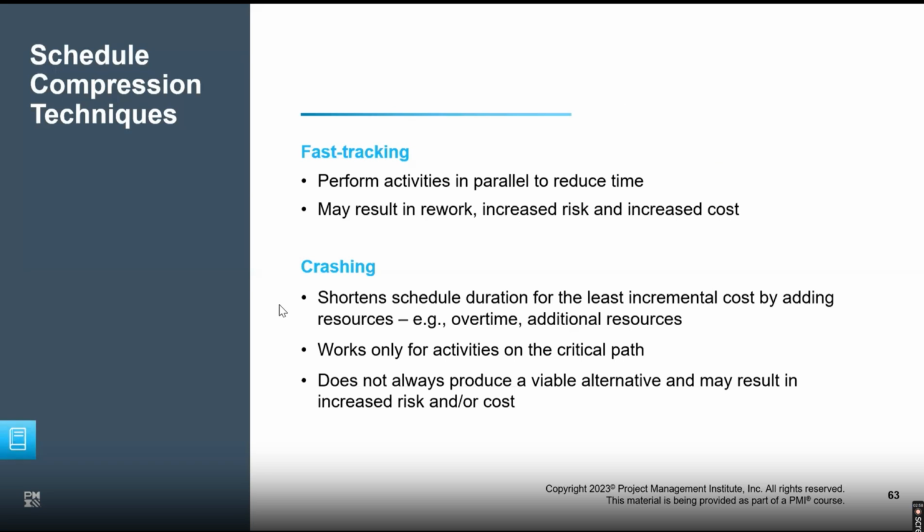See, contingency reserve will always be there. If the risk happens, then I use that budget. Otherwise, not. You can't use that budget for your regular work because actual cost is actual cost. But you have parked some extra budget for the risk factors, and if that risk happens, you're going to pick the money from those contingency funds. If it doesn't happen, it's untouched.